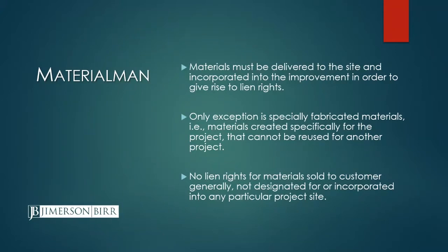So that's going to be the time frame for which you would be able to have your lien for rental equipment: the reasonable value of the rental equipment from the date of delivery to the earlier of those dates, when it's actually picked up, or 2 business days after notice is given for picking up the equipment.